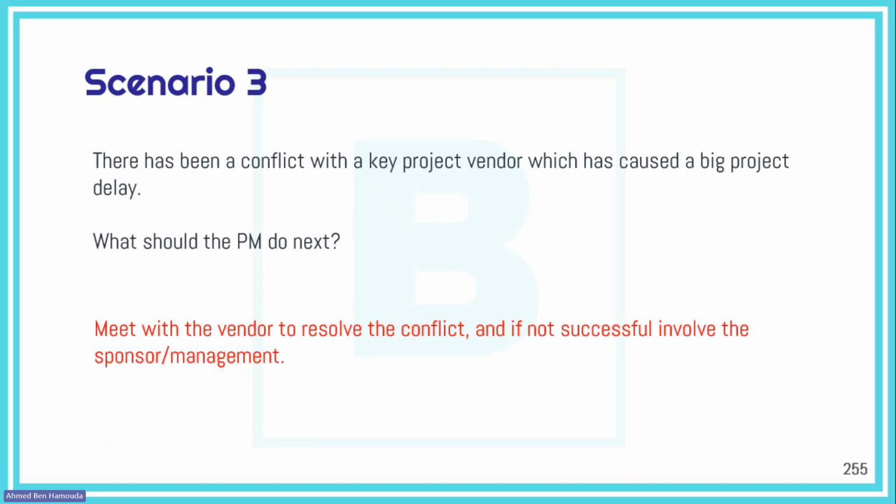Because sometimes once you reach an agreement during a meeting, people rethink it after the meeting and tend to change their minds. But what you do is, once you send out the meeting minutes, make sure that you highlight what has been approved in that discussion, and write down: please provide your approval within 24 hours. If you have any objections, please provide them within 24 hours. If you do not do so, then it's considered as approved. That can really save you from the hassle of rediscussing the matter again and again and again.